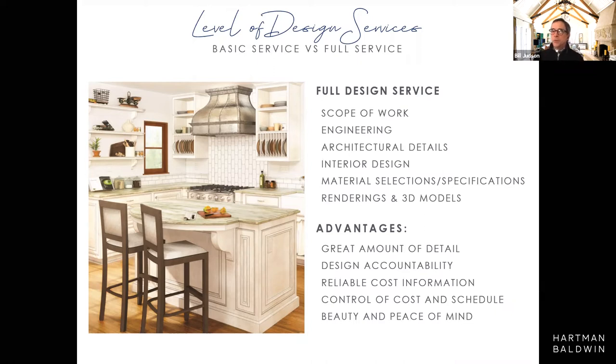Now, what does this do for us? It gives us a lot of detail on the plan. So now we've got some accountability to the design. If the soffit doesn't meet the crown mold the way it's shown in the drawing, then we can just show the drawing to the guy that put it in and go, hey, you bid these drawings. Here's that detail. This is the way it's supposed to be. We're accountable to the design.